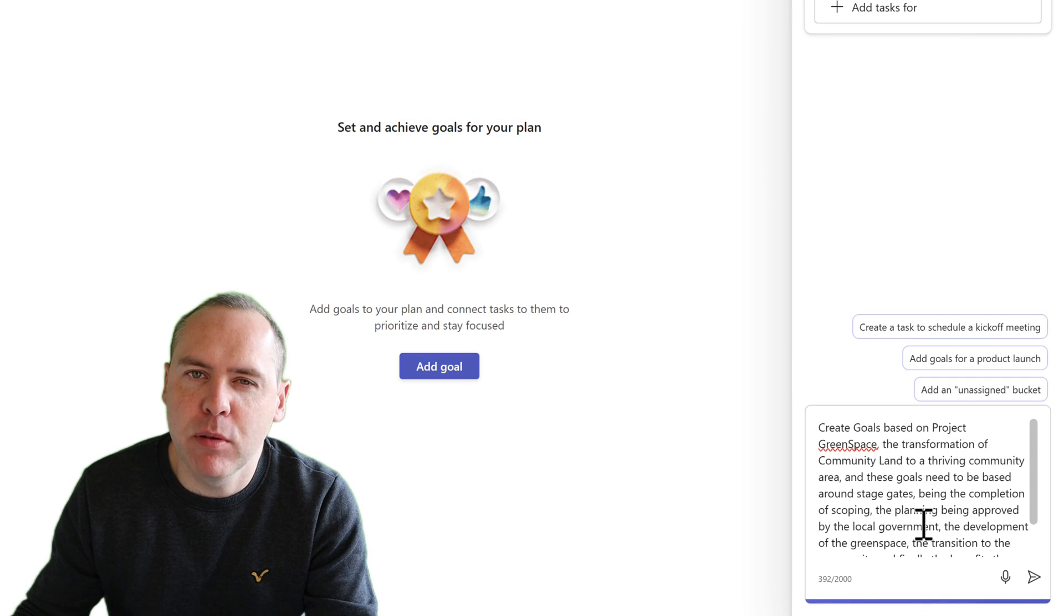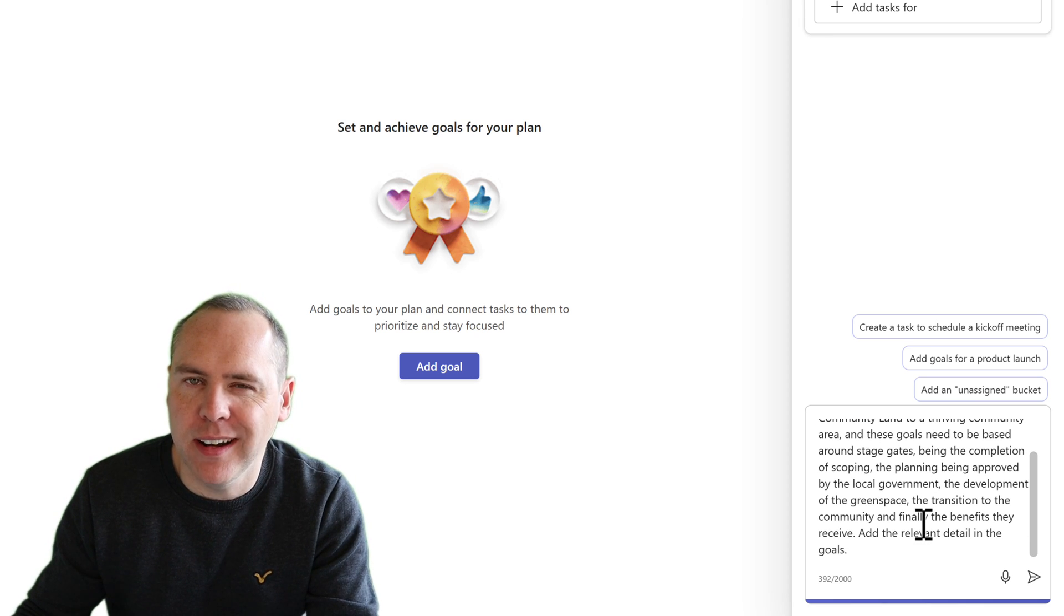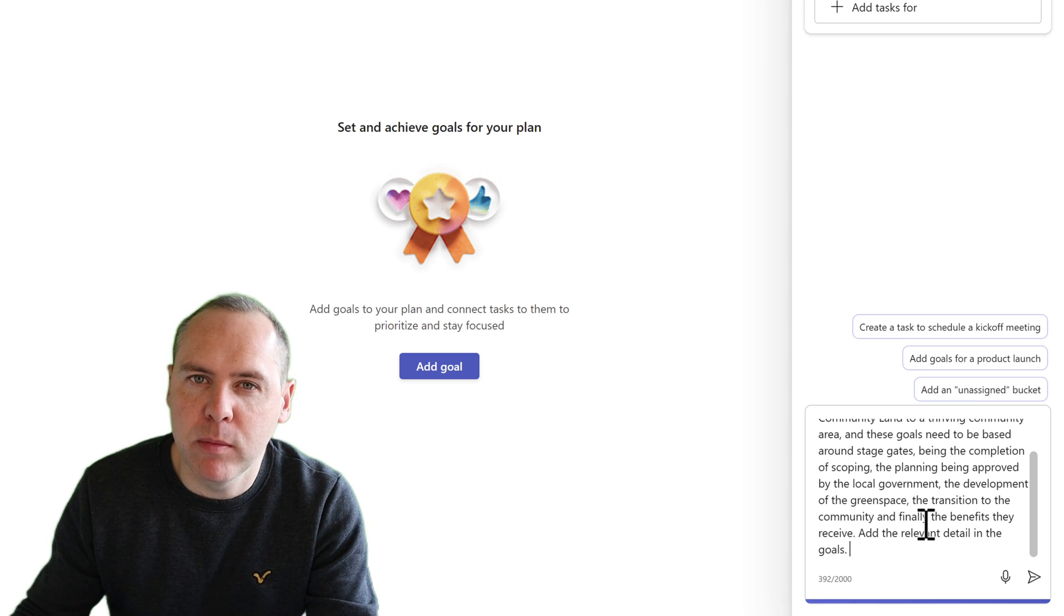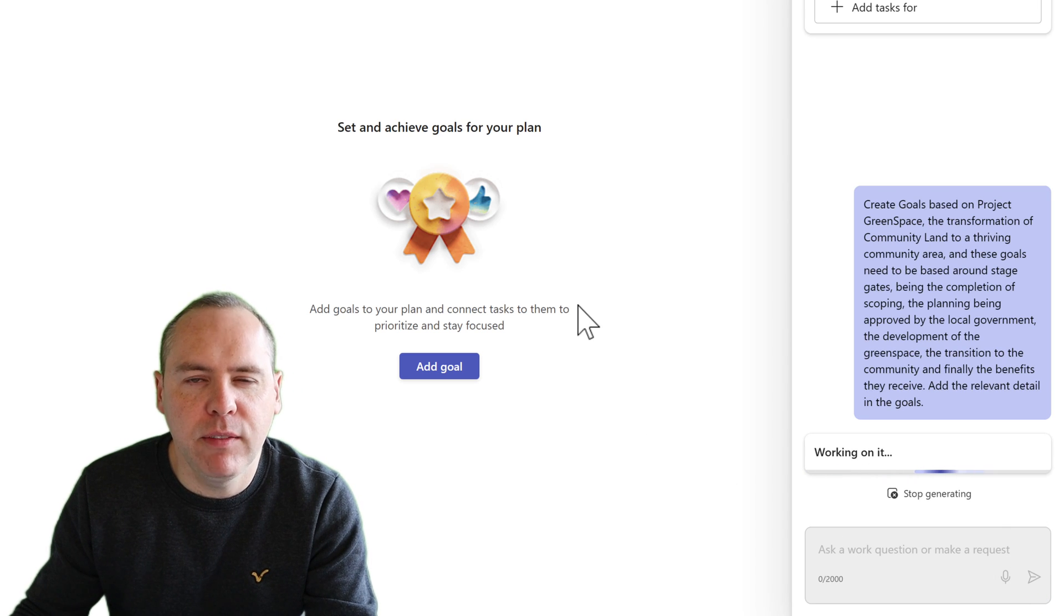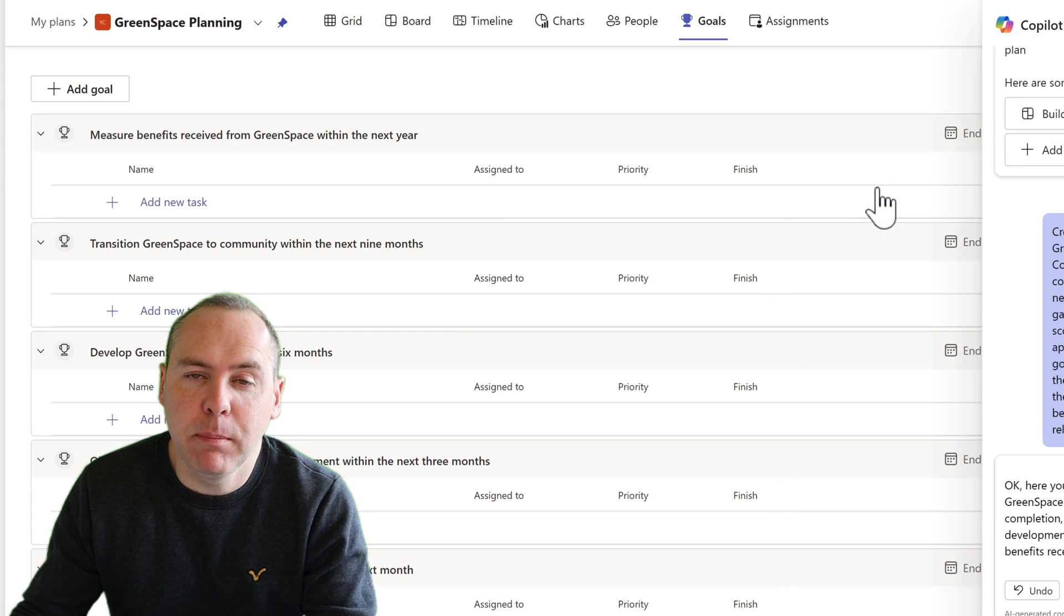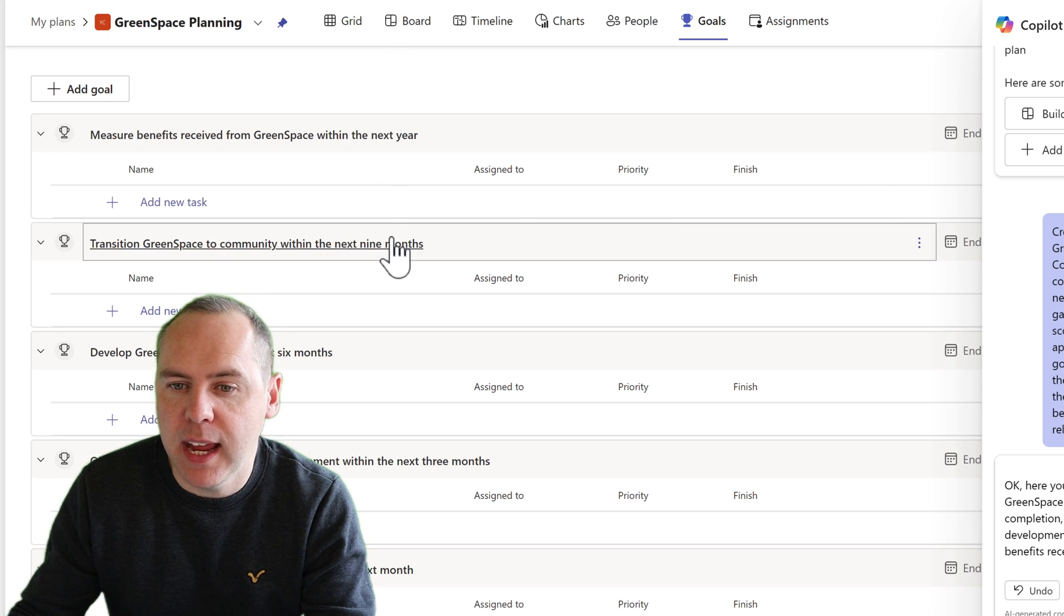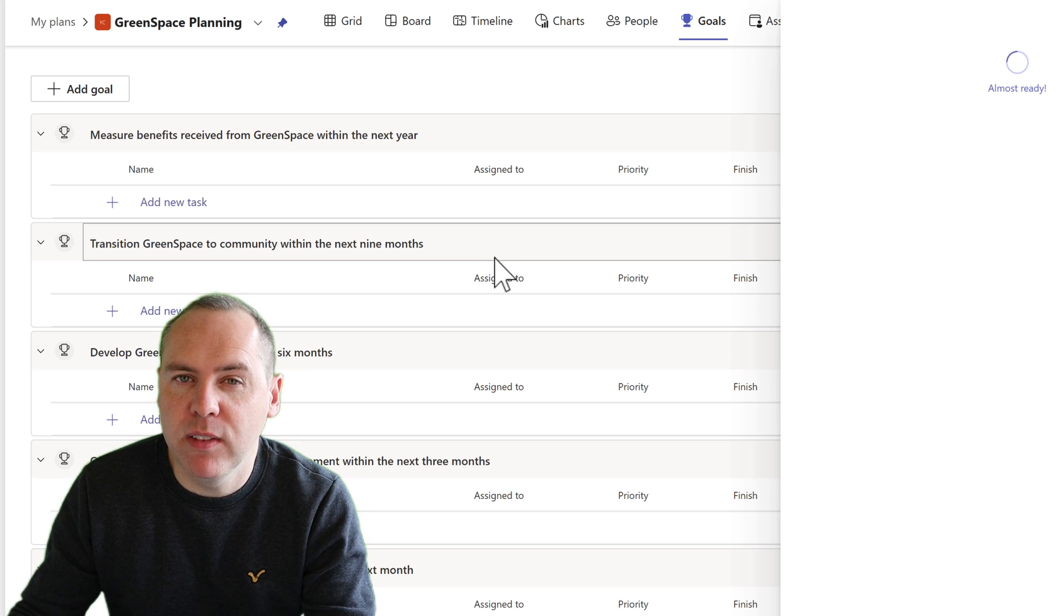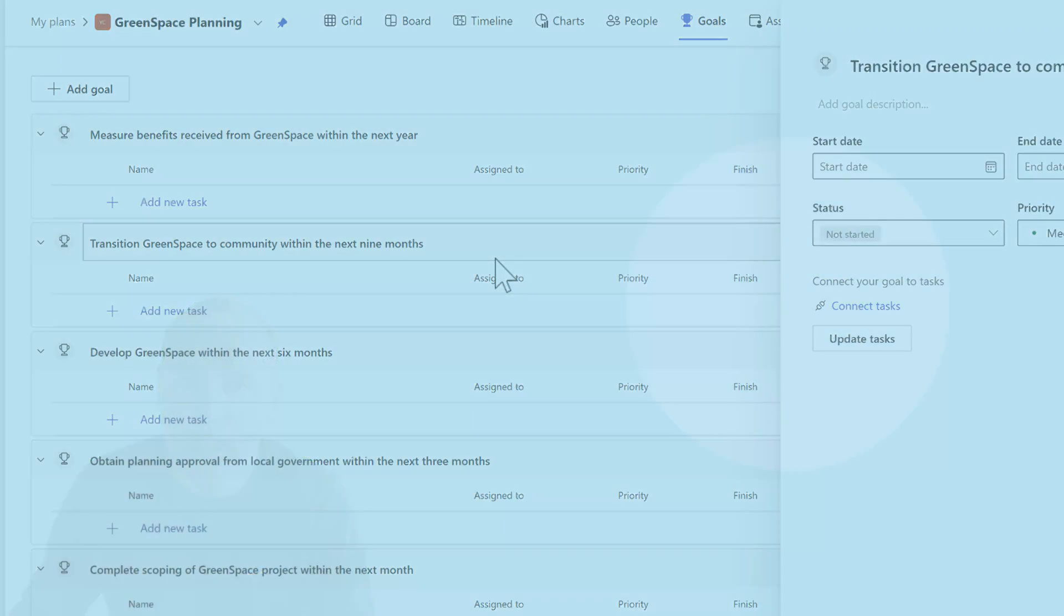Here we now drafted our prompt to Copilot and we're asking it to create goals based around these broad ideas. Yes, you will need to provide context to Copilot, it won't yet be able to use your tasks to work out the relevant goals. But this prompt took me a couple of minutes to generate. Let's go ahead and send it in and have a look at what Copilot generates for those goals in your project plan. And there we go. We now have goals set by Copilot. You can also see it's added in some timeframes that it's actually invented itself. But we could go in here and manually adjust any of the content that Copilot creates. And we can also connect relevant tasks into our goal as well to ensure it fully aligns to where you need to work with.